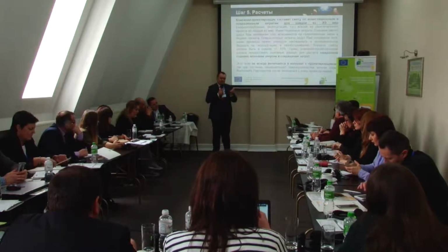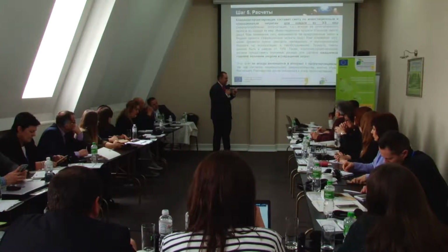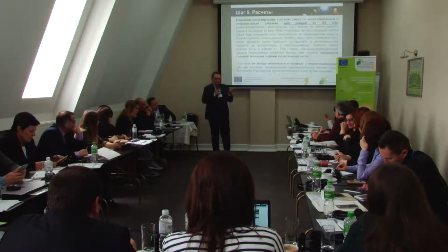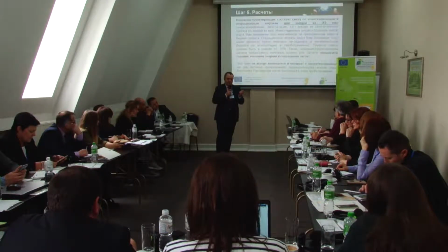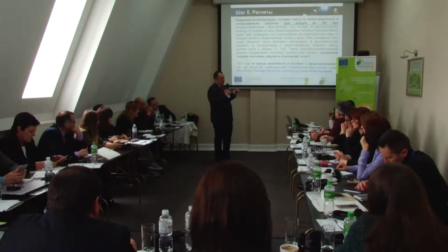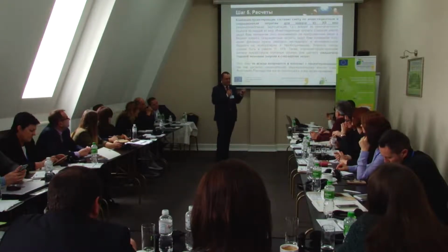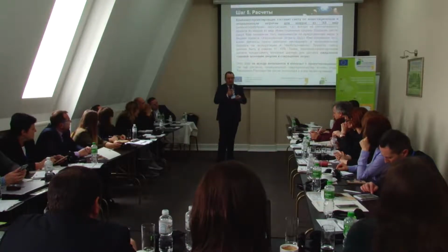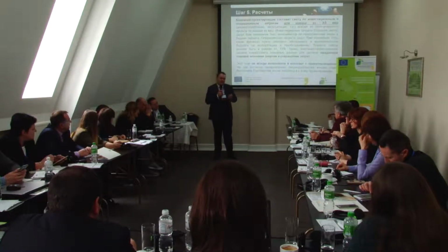Because this is not included in the standard contract with the designer. If they didn't have experience of working on similar projects, in 100% of cases, they will say that it's not in their contract and they will not do this. But you have to think it over and find a way out of it.